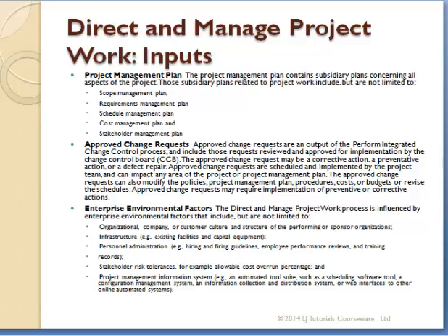As a project manager, you don't just shift the activities and just sit down and fold your hands. You should raise a change request and it should be approved. Now, whenever you raise a change request and it's approved, it comes back into this direct and manage work so that we can use it in planning and in actually working. Now we also use the EEFs and the OPA.